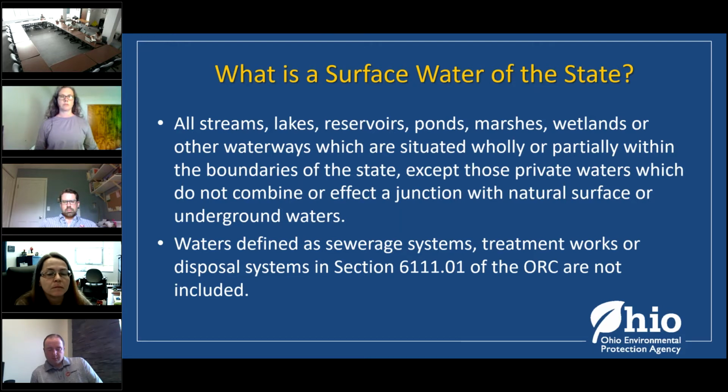And just to keep that in mind, what is the surface water of the state? Where does that time frame drop to 2 days? That's when you're near a stream, a lake, ponds, marshes, wetlands. But again, we're not talking about sewage systems. We're not talking about, did we put in a wastewater lagoon? Nope, that's not a surface water of the state, so we don't have to worry about that.